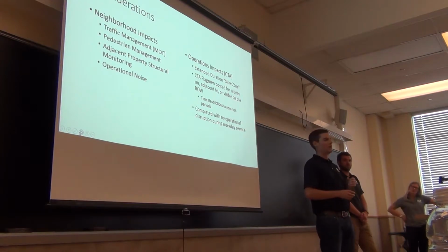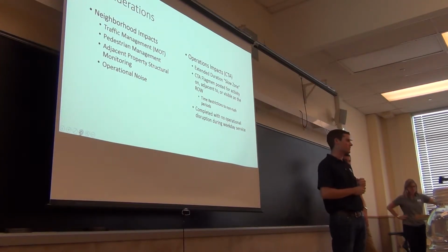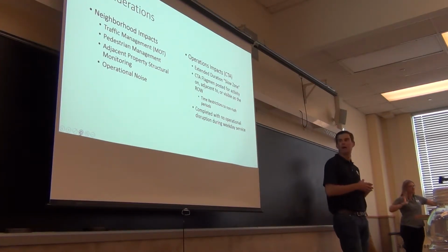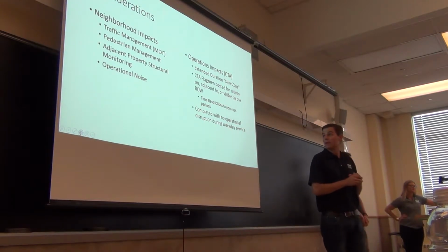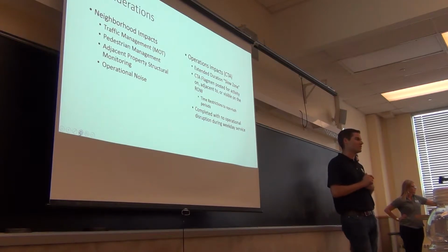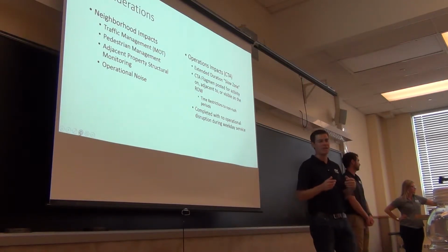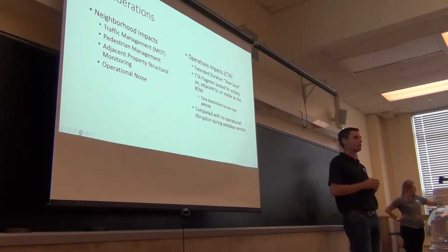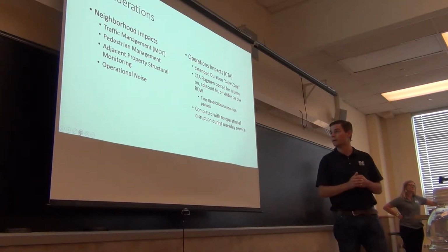We had a ton of flagging hours on this project just to try to manage the people that are moving around us. We also had to do structural monitoring of those properties that were adjacent to us. And that was dealing more so with the micropiles that we were drilling because we were going so deep. We did also do routine monitoring of the foundation walls of those structures that were nearby.